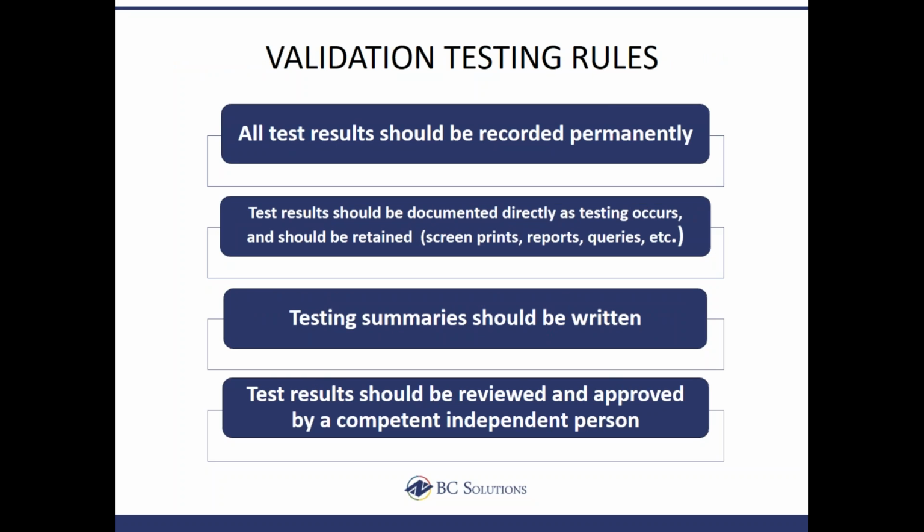Let's talk about a few rules for testing, and this is really any kind of testing. Whenever you're doing testing, all your test results should be recorded permanently. The test results should be documented directly as the testing occurred and should be retained. And those kinds of testing documents might be screen prints, reports that you run, queries that you make, etc. So everyone has a different idea of what the documented evidence is to show that your system is validated.